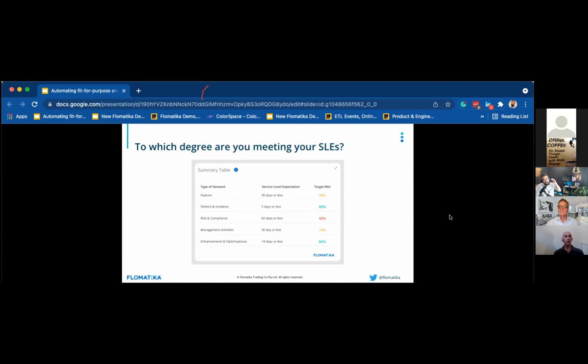But it sets the North Star, right? And that changes the game, almost like magic, because we know that most of the lead time is made out of delays, right? Waiting time. So if people understand for the first time what the service level expectation is, if you make that explicit, they actually like it because they know how to compare where they are and what success looks like. And especially because they can use that to inform their decision-making on a daily basis, right?